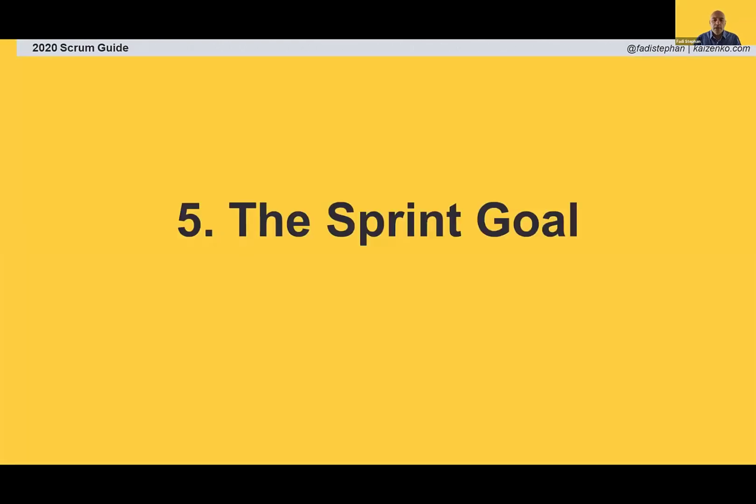Next, we have a sprint goal. All right, so unlike the product goal, the sprint goal is not new. It was always there. However, many teams glossed over it. In sprint planning, teams would not have one goal they are working towards for that sprint. They would gloss over it. And what ends up happening is team members would be working on siloed tasks, separate activities, not related to each other. To fix this, the 2020 Scrum Guide elevates the sprint goal. So like we have a product goal that goes in the product backlog, we have a sprint goal that goes in the sprint backlog, and it is tied to the product goal. This ensures that as a team, we are working together collaboratively as opposed to siloed and working on separate activities.